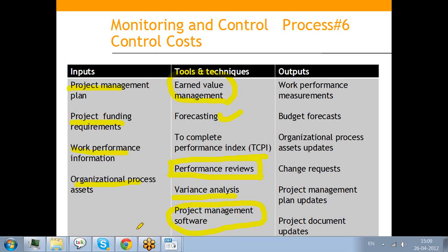For a smaller project, the work packages should be smaller, because we discussed this 8/80 rule, where for smaller projects the work packages should be towards 8 hours, and for large projects the work package can be towards 80 hours, or anything in between. If you can follow all this rigor in your project planning, then an effective implementation of earned value management is possible. It is not difficult, but it calls for a lot of discipline while planning the project.